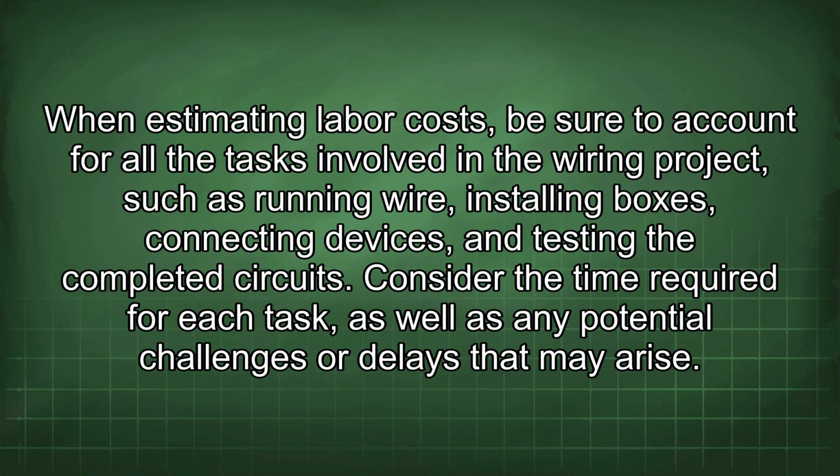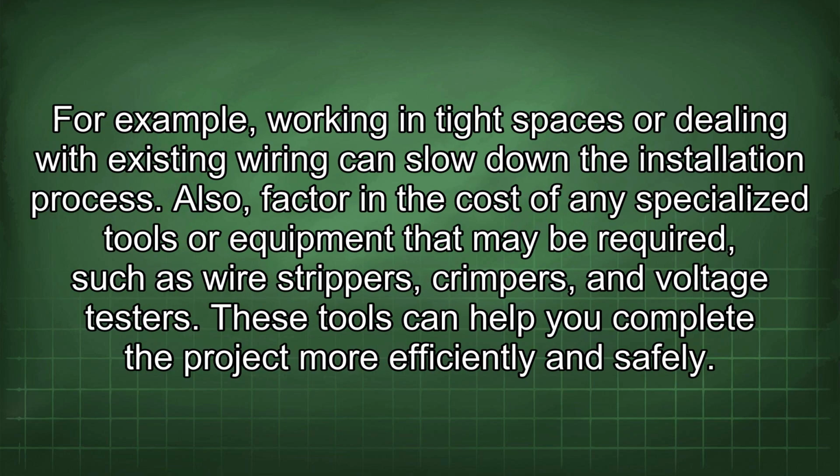When estimating labor costs, be sure to account for all the tasks involved in the wiring project, such as running wire, installing boxes, connecting devices, and testing the completed circuits. Consider the time required for each task, as well as any potential challenges or delays that may arise. For example, working in tight spaces or dealing with existing wiring can slow down the installation process.